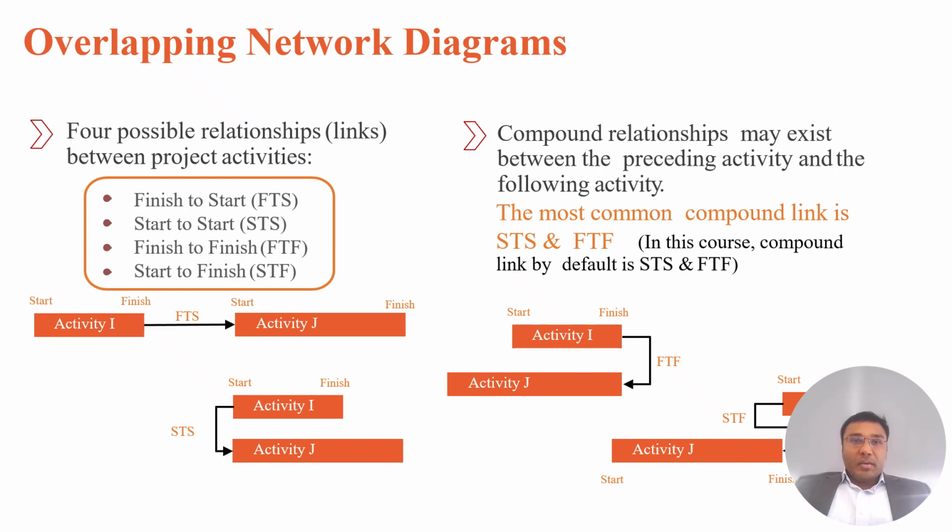One example you can think of for finish to start is painting only after plastering is done. Only when the plastering work is done should you be able to paint. So that's the finish to start.